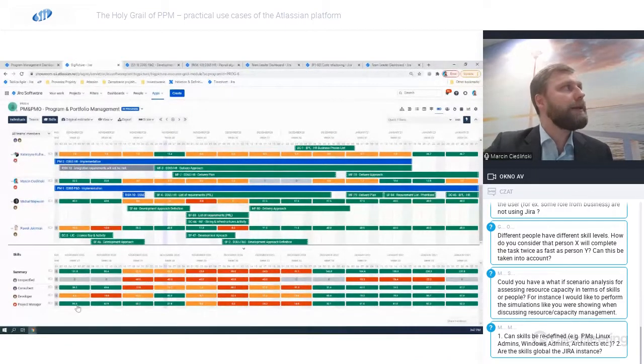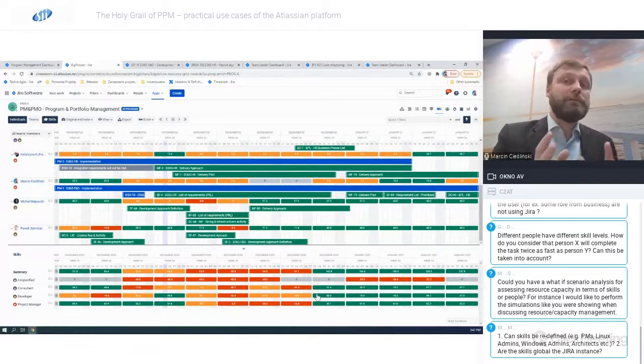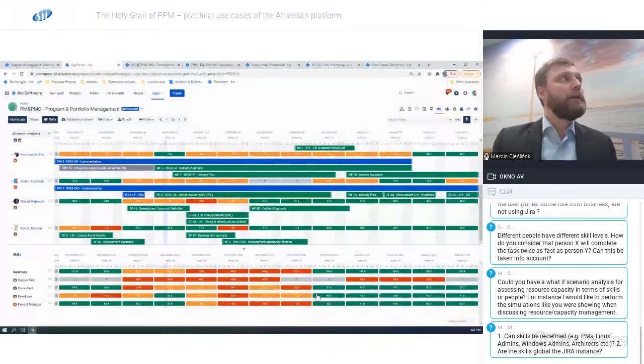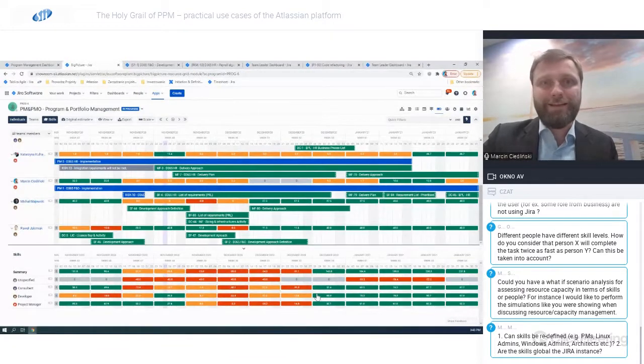Look, I'm underutilizing my project managers in November, pretty much, but I'm heavily overutilizing them in December. That's not right, right? So probably I should make sure I can do some project manager work earlier on, so I can engage my project managers in November, so that they are less engaged in December. That would be my first guess, right?